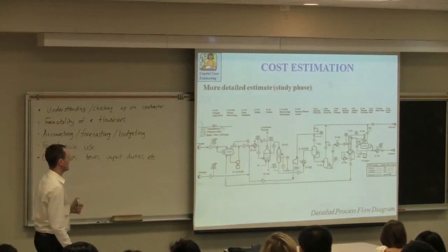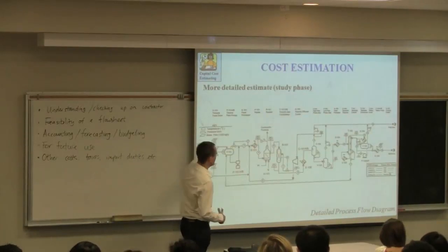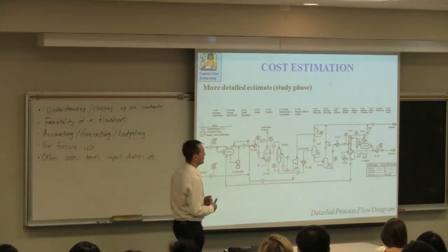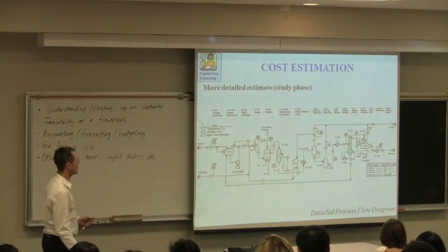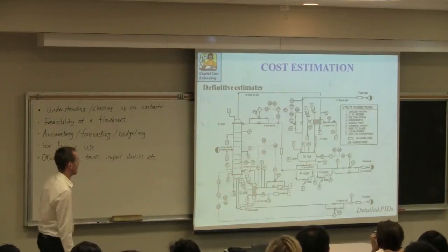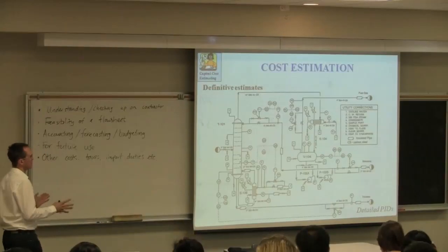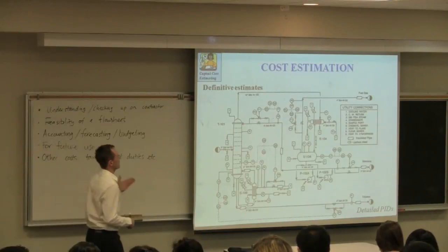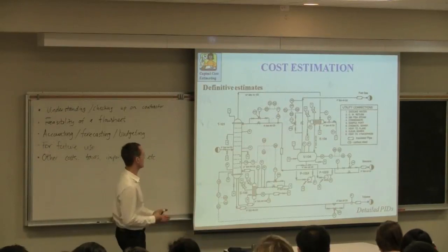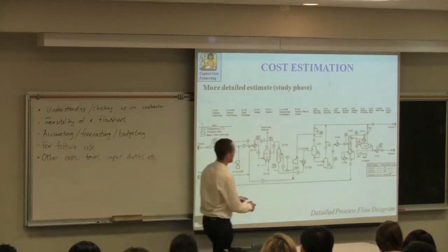Then you would go from that flow sheet to this one, where you've got even more detailed units now, not shown on this slide, but there would be all the flow rates, the energy terms, temperatures of the various streams. And then the final stage where we're ending up with as-built almost, or close to as-built. This is where we've got a definitive estimate that's probably within error of about 5 to 10%. And these are the diagrams that are handed over to the contractors to then build the units. If you're wondering where this comes from, this is just this part of the flow sheet.